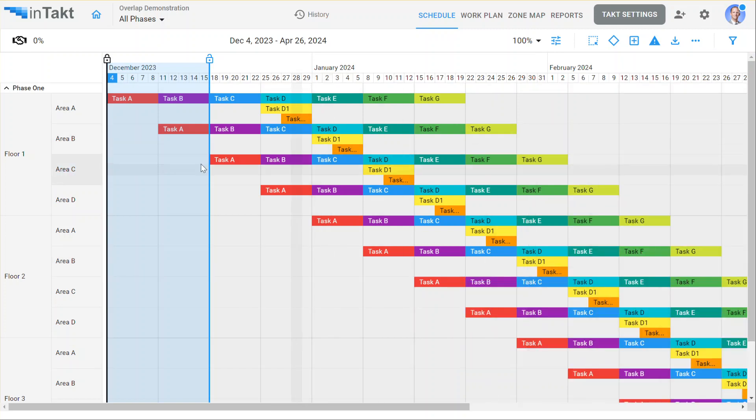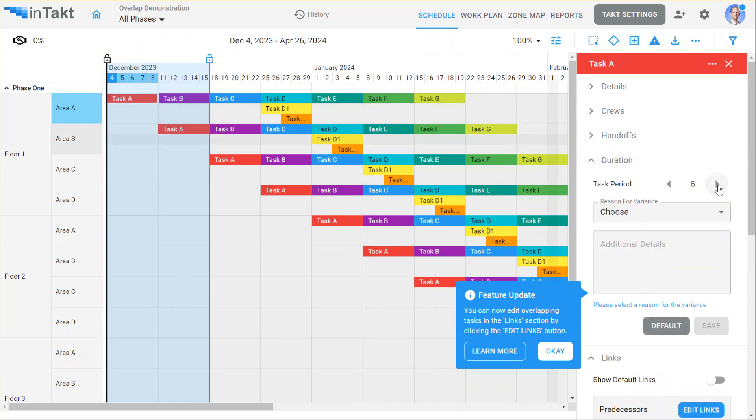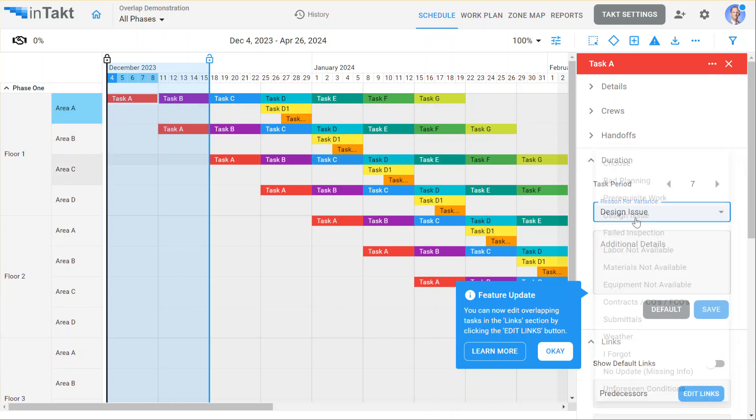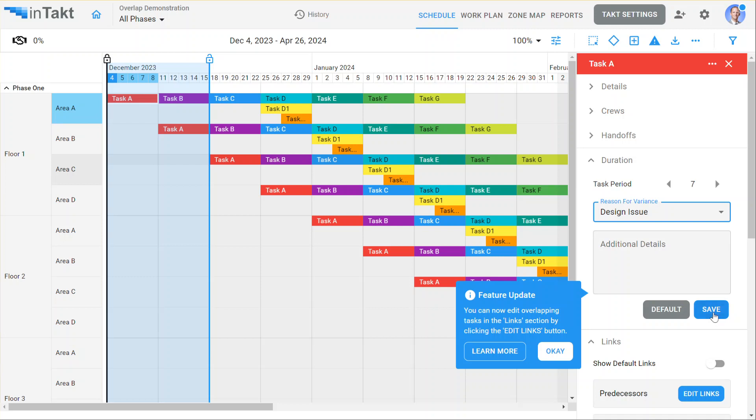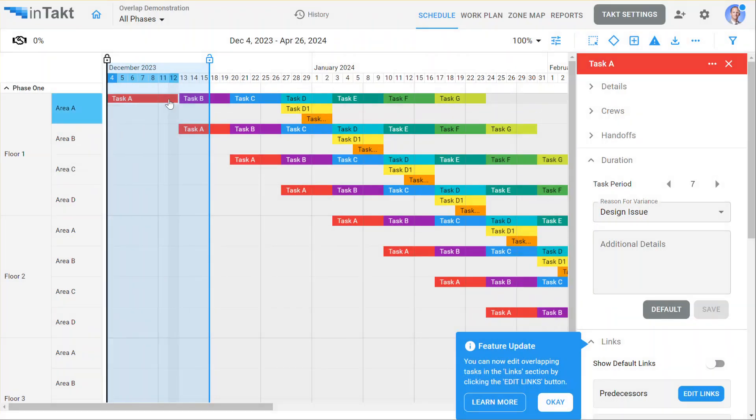And now let's say we're updating the schedule here with task A. And let's say its task duration has increased. Since it's during this lockline period, it's going to ask me for a reason. It's a design issue. I'm going to hit save on this. You'll notice now that task A is pushed out, pushed all the other tasks out.